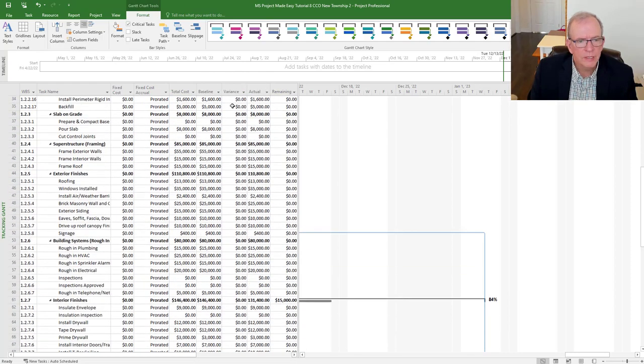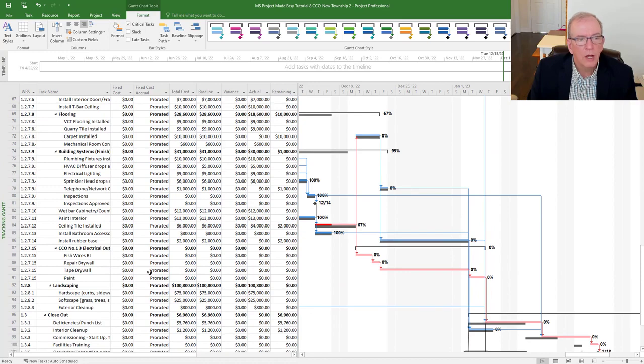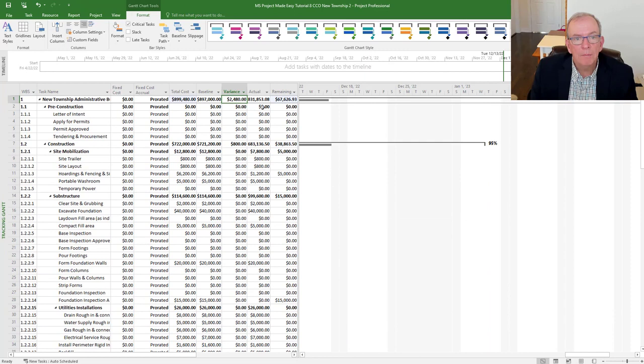If the variance is there now, it is as a result of this taking longer and having an impact most likely on your resources that are variable, that were applied to the overall project or to the construction project. If they weren't on the high level, maybe they were on pre-construction or construction. Likely it's because they're pushing the construction out 2 working days.